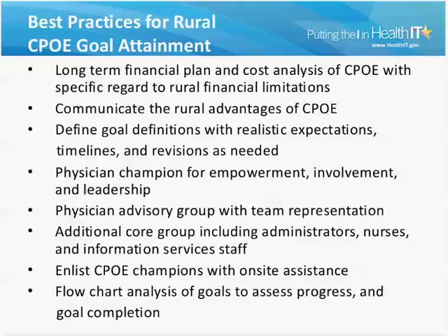What I have seen is that a newer, very stalwart younger physician who understands the technology and can speak that language can really help bridge between physicians who may be more resistant to the change in paradigm from paper to electronics. And I'll tell you what, in every case where I have seen an implementation fail or falter, it is because of a lack of physician leadership within the organization.